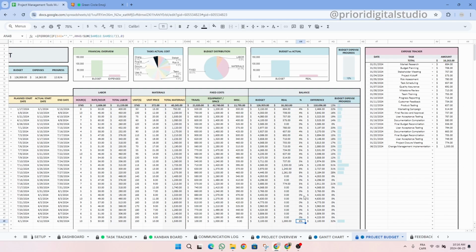And then as you can see here, we have another column named with the percentage symbol, and it represents the portion of the expense for this task compared to the overall project, meaning that our last task in the example is 6% of our total project expenses. So in other words, $1,000 is 6% of this $16,000, which is the total cost for the whole project.